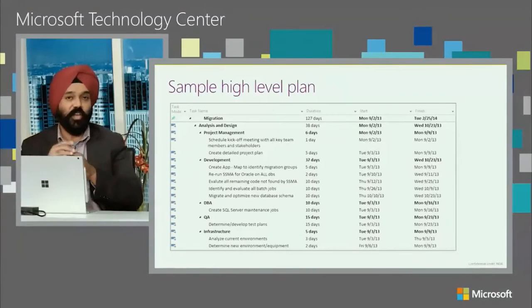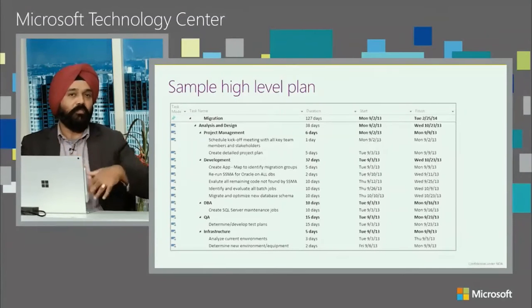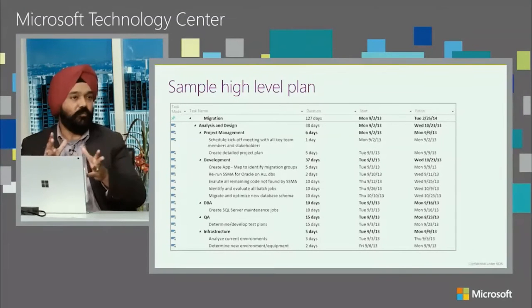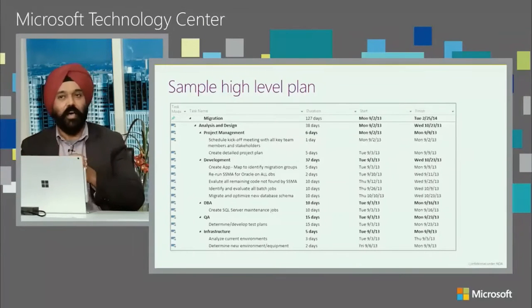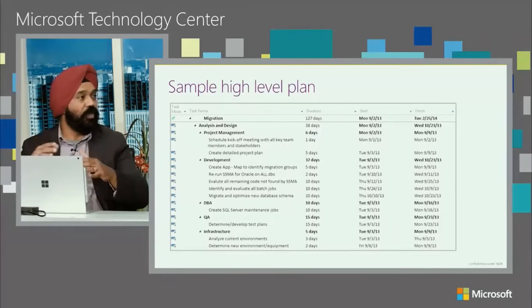And I'm glad you noted that, because we don't want customers to feel like every migration is going to be a piece of cake, where you just click, and you're over to SQL Server. Run the tool and you're done. Exactly. However, I'll tell you that this is more of a highly complex migration example. So we want to start with a higher watermark, right? It's about 127 days of actual migration. This is from an actual customer that we did a migration for, about 127 days of actuals from start to end, and it is a highly complex application example.